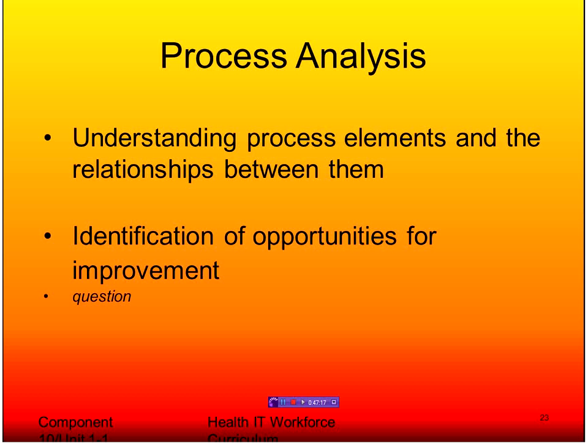Process analysis and understanding relationships in the big picture of what you're trying to do is really important, and it's important to define which things can be done parallel versus sequentially. If you recall when I talked about the spaghetti, the parallel is when you get the second pot and you start to boil the water for the noodles at the same time the sauce is cooking. Your sequential is getting the pot first and then filling the pot and then simmering the pot, if that makes sense. So sequentials are 1, 2, 3, 4, the steps happen in order, while parallel steps are happening at the same time potentially.